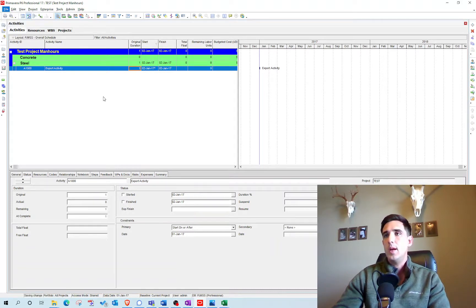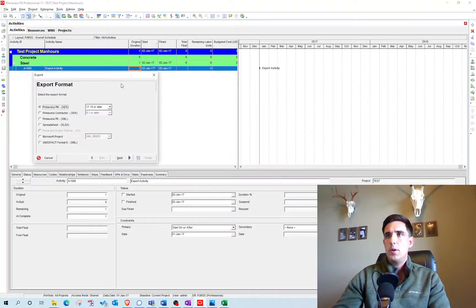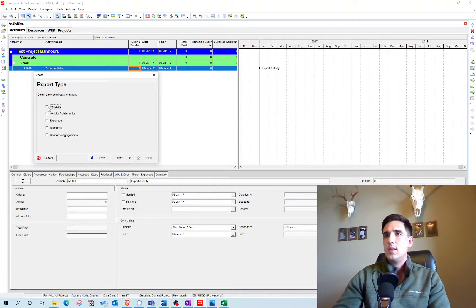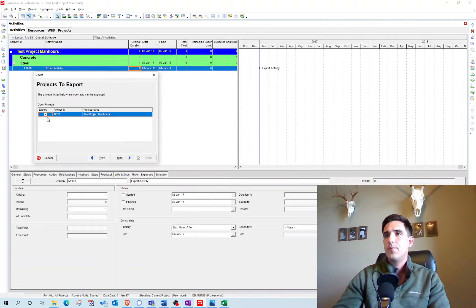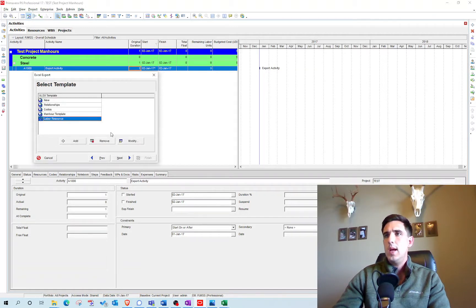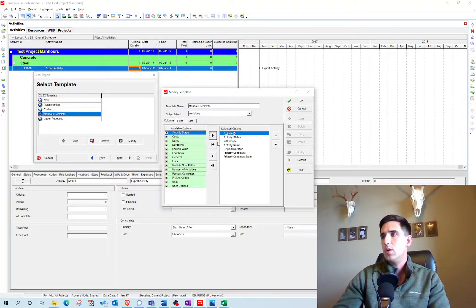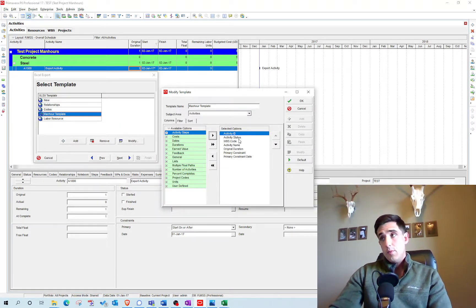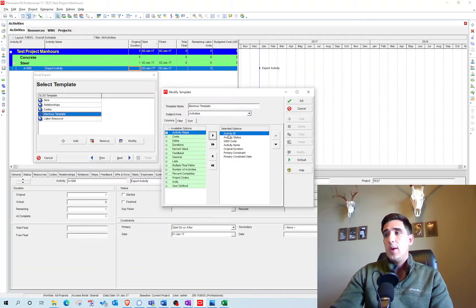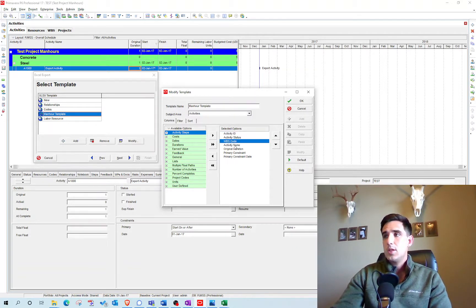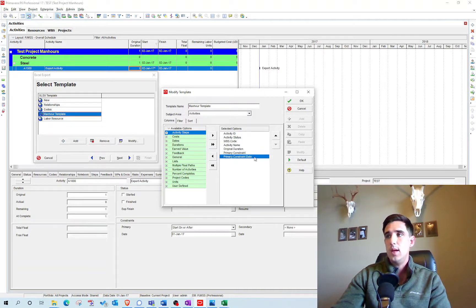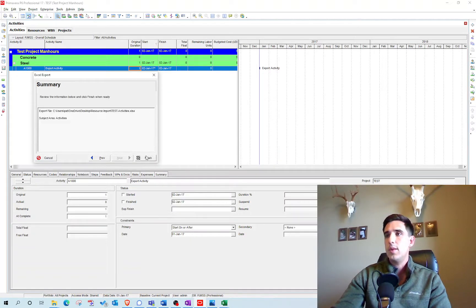I'm going to go File > Export > Spreadsheet, then go Next, select Activities, and go Next again. I have a man hour template created. The relevant information you need to make sure you have is: Activity ID, WBS code, Activity Name, Original Duration, Primary Constraint, and the Primary Constraint Date. Make sure you have those, then go ahead and export that file.